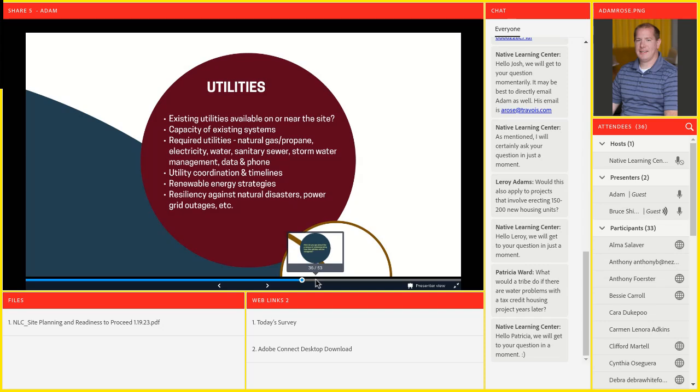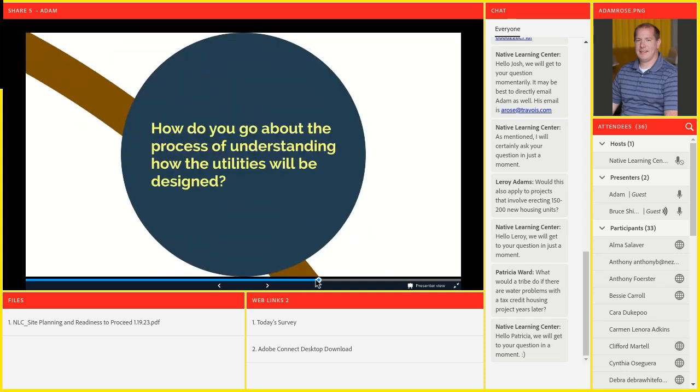What once was, you file your plans for development with PG&E, they review it, and then at X date they come out and make the connections and turn your power and gas on, you can't rely on that anymore. They're holding up the start of projects by some weeks or sometimes months because they're just overwhelmed.